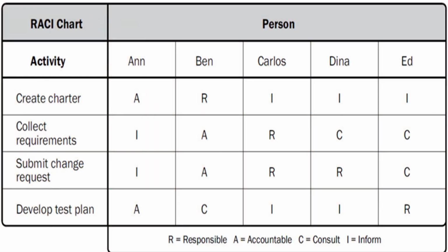A responsibility assignment matrix shows the project resources assigned to each work package. It is used to illustrate the connections between work packages or activities and project team members. On larger projects, responsibility assignment matrices can be developed at various levels. For example, a high-level responsibility assignment matrix can define the responsibilities of a project team, group, or unit within each component of the work breakdown structure. Lower-level responsibility assignment matrices are used within the group to designate roles, responsibilities, and levels of authority for specific activities.